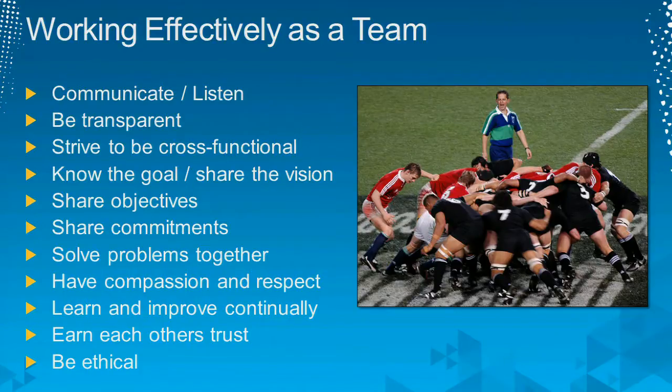Well, one thing I preach is not everybody needs to own all of those tasks up front. At the end of the sprint planning meeting, you've got 20 tasks, maybe 4 of them are owned. And then every day, every time you finish a task, you go back to the queue and say, well, I'm done. I'm committing to doing work. I'm a good team member.